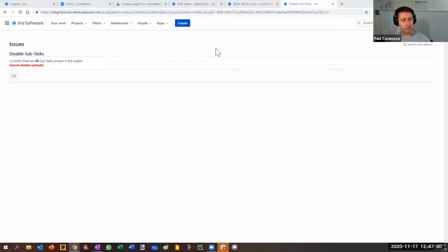So for a story, provided that stories get finished within one sprint, then subtasks are quite handy. If you wanted to have testing subtasks and all the rest of it for a story, that would be okay. You might have heard in Scrum, we talk about vertically slicing instead of horizontal. So you wouldn't have one story which is create the database, another story which is design front end and that sort of thing. It'd be more around articulating functional value, so something that is useful for a product owner.